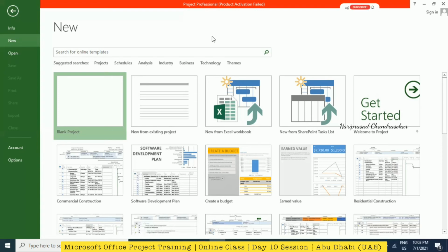Based on that, I will verify with my teams and engineers or whoever is involved, because the percentage completion, the current start and finish, and the baseline finish, I have to make sure these are met because I have to release payments.